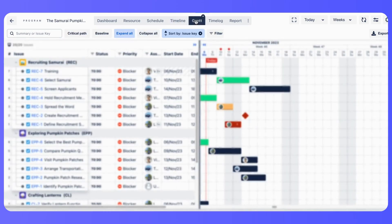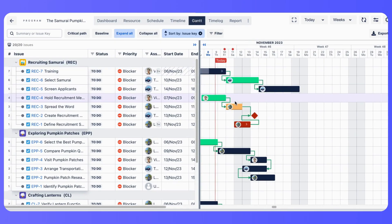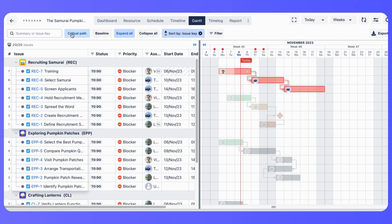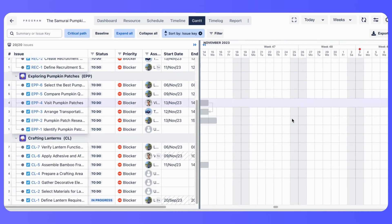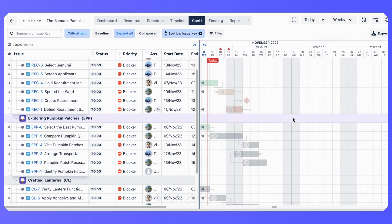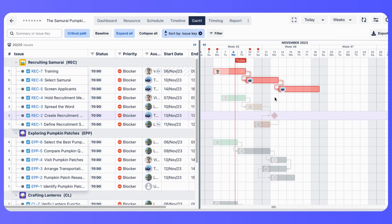While Gantt chart maintains a custom hierarchy based on the work breakdown structure, WBS number. Gantt chart provides advanced Gantt features such as baseline, critical path, and inline task creation.